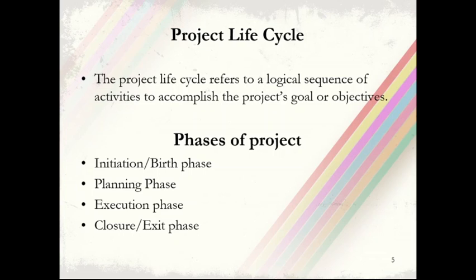Once the recommended solution is approved, a project is initiated to deliver the approved solution and a project manager is appointed. In the next phase, that is planning phase, the project solution is further developed in as much detail as possible, and the steps necessary to meet the project objectives are planned. In this step, the team identifies all of the work to be done, the project tasks and the resource requirements are identified along with the strategy for producing them.